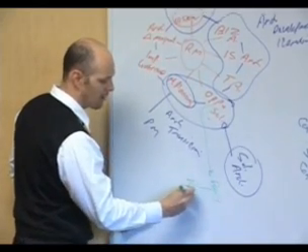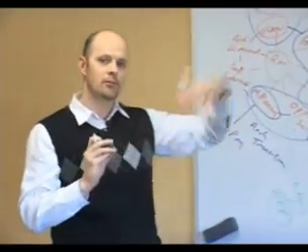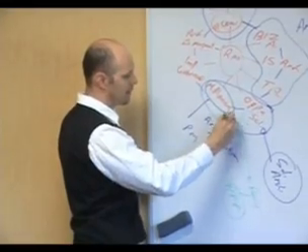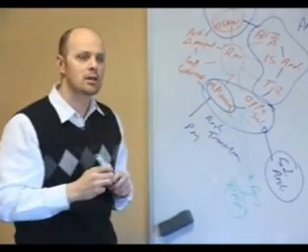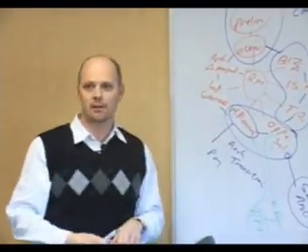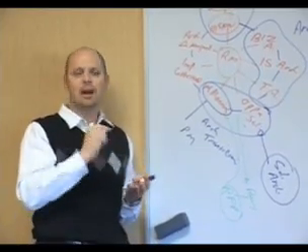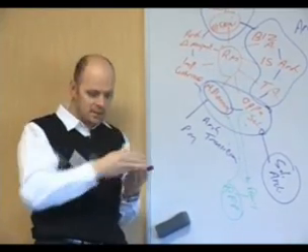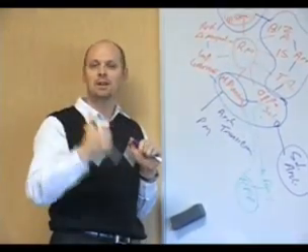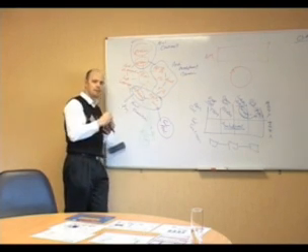then this is traditionally where a request for proposal comes out. So it goes to market, vendors respond with their time, effort and costs. That information comes back into migration planning so that the project manager can now have a view of the cost and effort. And that's all that happens here, is we're looking at cost, effort, resourcing, other projects that are available, critical projects, and we're doing project management techniques to try and align all of these up once again across a strategic, segmented, and a capability layer. So that's what's happening there.